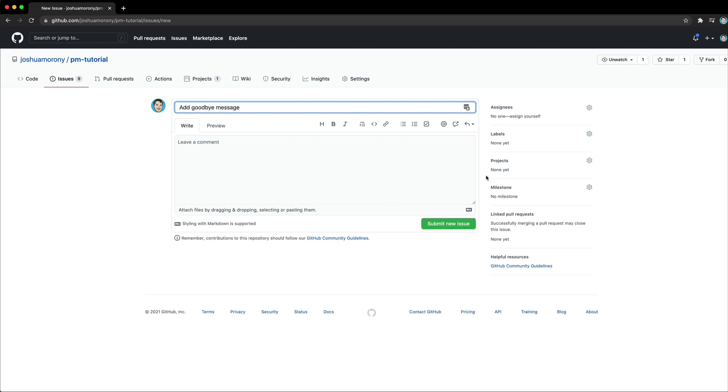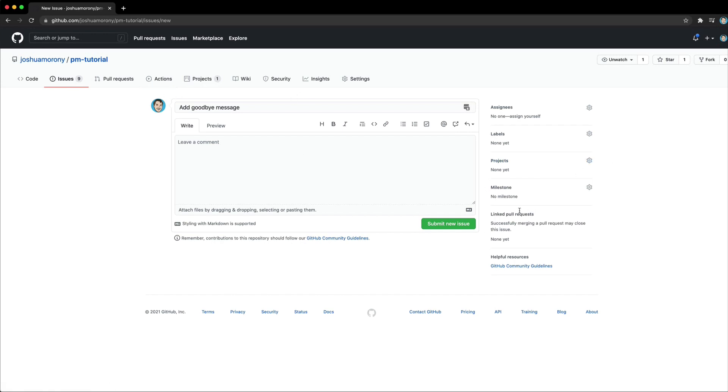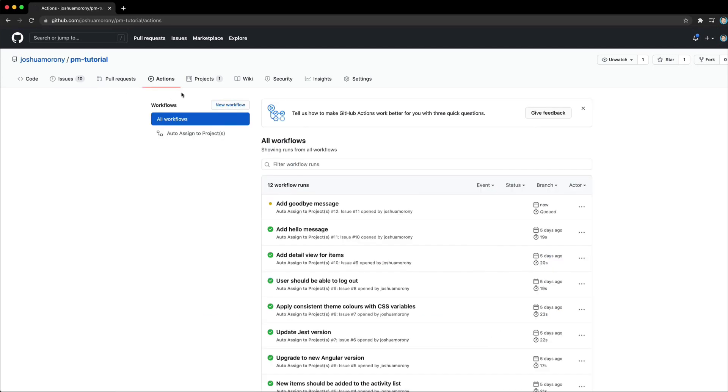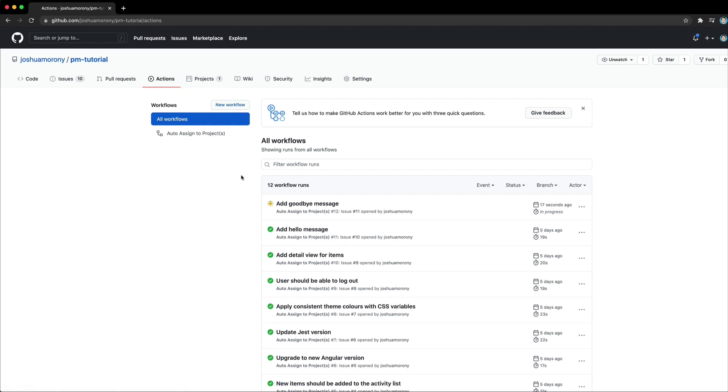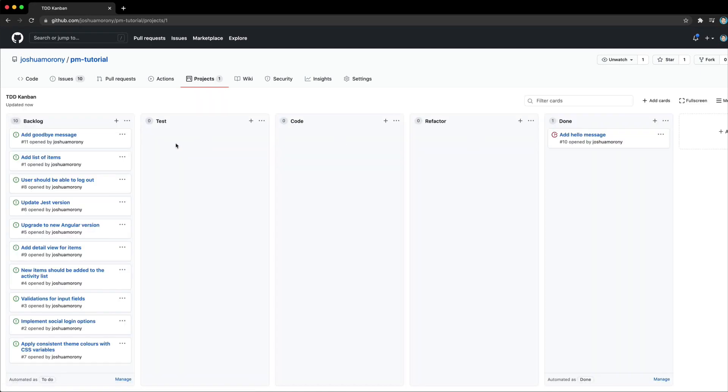And so what we can do is if we click this project setting icon here, we can manually add that to our Kanban board, but we also have a GitHub action set up in case we forget to do that. So what I'm going to do is not add it to the board and just submit this new issue. And what's going to happen is you'll see this action here is going to run. You see it's queued now, and this is going to take about maybe 30 seconds or so to actually complete. So in general, if you want that available in the Kanban board right away, it's better just to add it manually, but it's good to have this action here in case we miss adding something. If someone adds a new issue and forgets to add it to the project, then that issue might just go unnoticed and nobody will know about it because this is primarily where we're working from and where we're generating our new work from. Okay. So it's in the backlog. Now the issue has been added here.